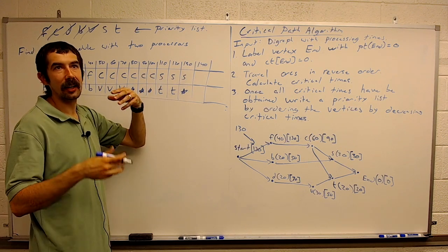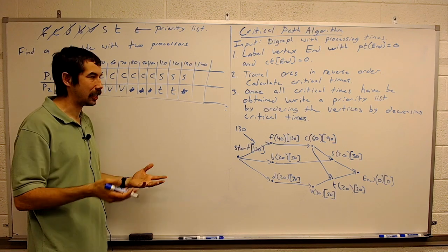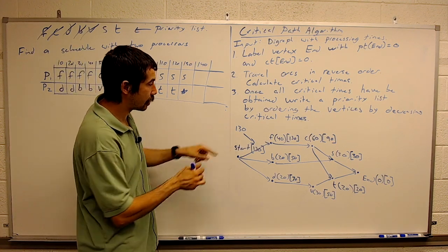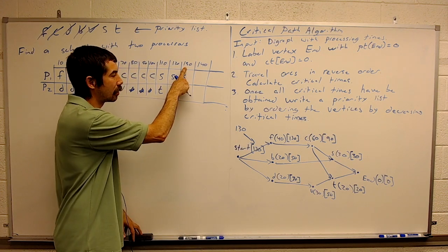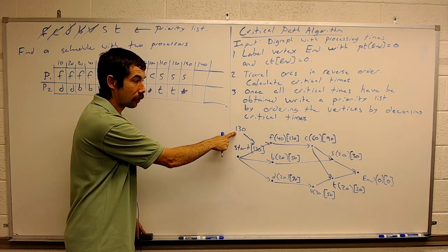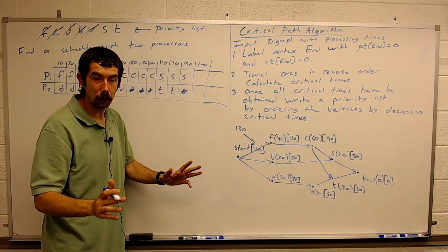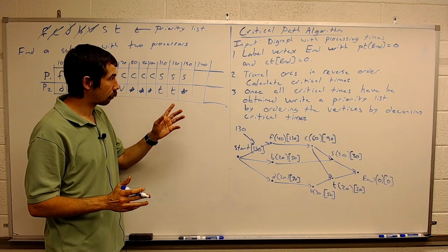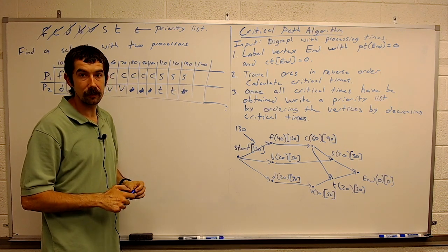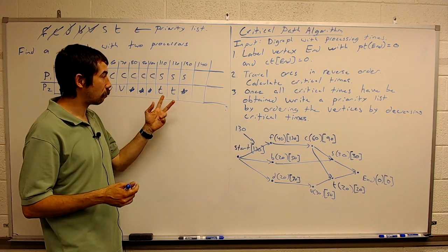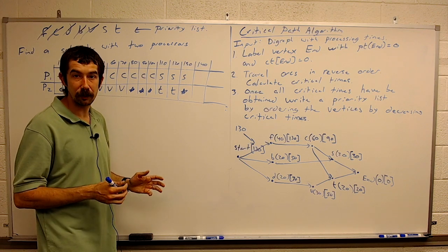And you might be asking, could it be more efficient to hire more employees to help with these tasks? And the answer is not in this case. Since our 130 matched the critical time of start, no matter how many employees you have, 130 is the best case scenario. So with just 2 people, we completed all these tasks as efficiently as possible.